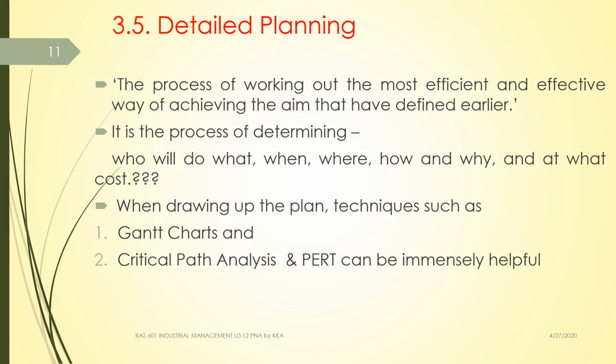Basically, CPM is the deterministic type of technique in which the time estimates are of a deterministic nature, whereas PERT is the probabilistic time study, or scheduling technique, in which we take optimistic, pessimistic, and most likely time, and with the help of a formula, by taking the proper time estimation, we prepare the schedule for the project and activities.